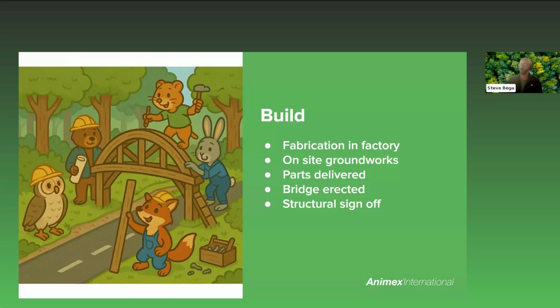In an ideal world, once your design is approved, it's best to have your groundworks and installation preparations happening simultaneously while the rest of the bridge is being fabricated. Then when both are complete, everything can arrive on site and is assembled, and wildlife can hopefully begin using it at the earliest possible opportunity. Now, in reality, that perfect sequence doesn't always happen, but generally installation is straightforward, and most bridges we've worked on have been installed within a day or two.